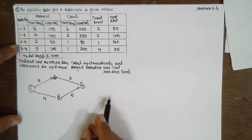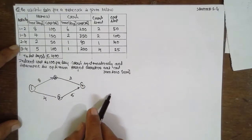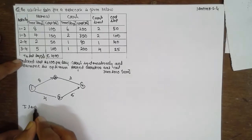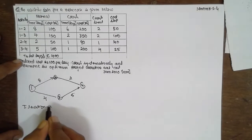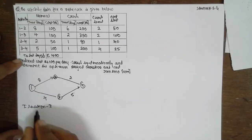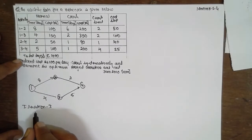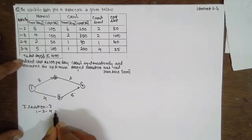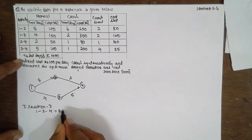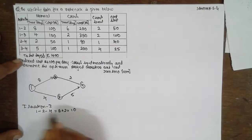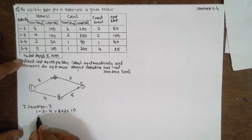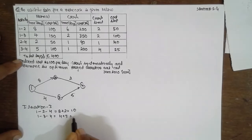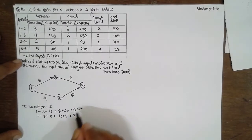Now we are going to find out the critical path. I will consider iteration 1. Path 1-2-4: duration is 8 plus 2 equals 10. Path 1-3-4: duration is 4 plus 5 equals 9. The critical path is 1-2-4 with duration 10.